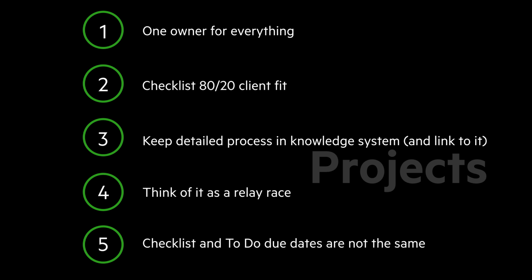And the last one here is there's not one date that rules them all. There are multiple due dates for things, because what I'm going to prioritize to do in my day-to-day is different than when the actual process dictates that something has to be done in order to make the due date that was promised to the client. And so you are tracking different dates for that reason. Be cognizant of that. That is indeed the case.